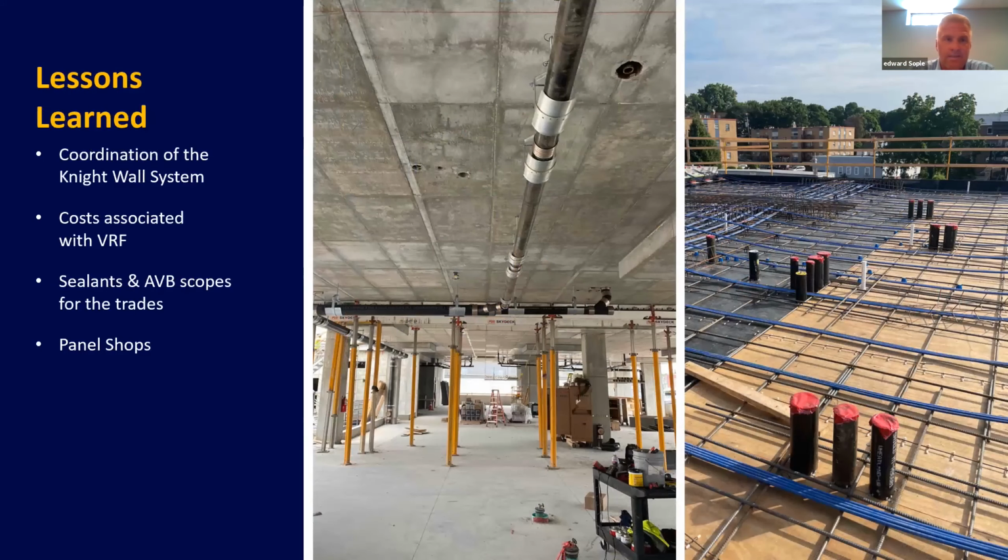Lessons learned for us: the coordination of the wall system was a big one, with the windows and the framer. Cost associated with the VRF. Again, if your baseline budget has the down and dirty Aquatherm system or a wall pack, or all the other different versions of what market rate or hotel-based HVAC systems are, and you move to VRF, then you'll have to absorb a little bit of cost there.